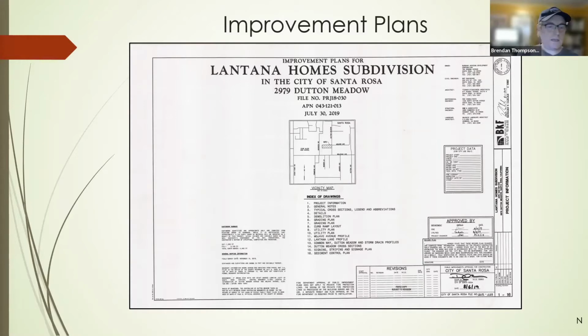I was going to say basically what you just said. If you have site-specific constraints or site-specific conditions that necessitate an alternative design that's not in the manual, you're free to propose them. And I say propose because, as Nick said, there is a process. Typically, the city or county would notify us and we would review it. And what we would be looking for is to see if it meets the intent. So are we getting adequate treatment from a system that's going to be reliable, that isn't going to fail? Are we going to get full treatment from a vegetated component?